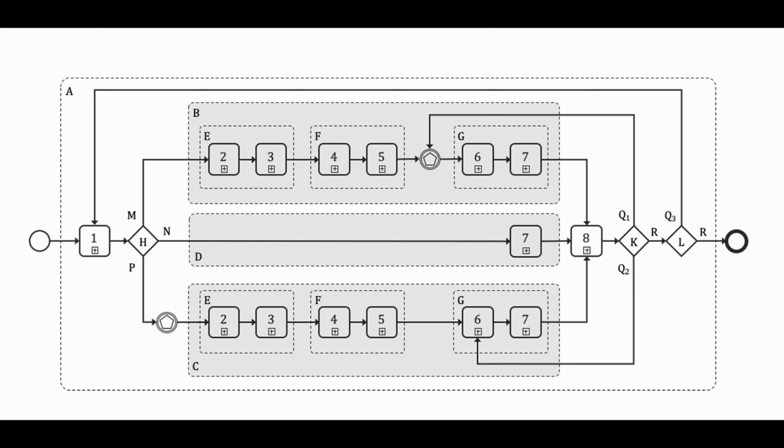3 process paths: plan, react, acquire. The standard distinguishes 3 information flow scenarios depending on the type of trigger event. Planned events. In this scenario, tendering and mobilization can be carried out in advance. For example, through a framework agreement covering information model updates when required.